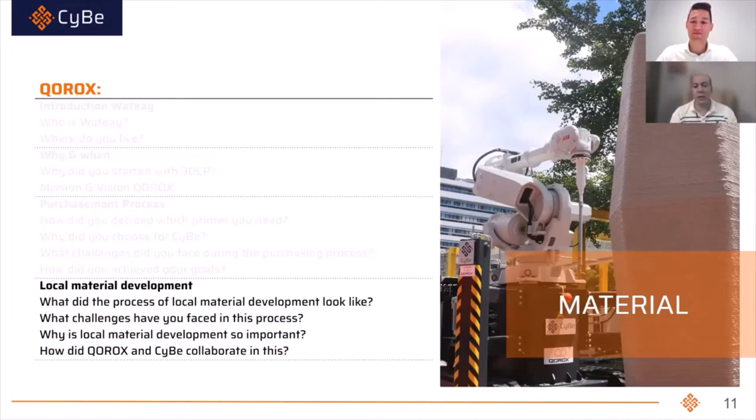But anyway, the material overall is a process. It's not going to happen overnight. There are samples that need to be reviewed and checked. The biggest challenge is the consistency of the raw material, and then after that, the quality control and the factory that you'll be using to mix the material. If you get these through, and you have good consistency in supply and good consistency in the quality control of the mixing plant, you'll be pretty much almost there. You would continuously have to tweak the recipe because aggregates behave differently depending on which part of the world you're in. And allow for at least 6 months of R&D in that.